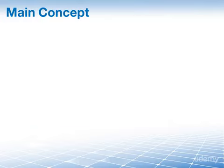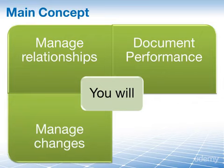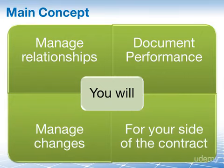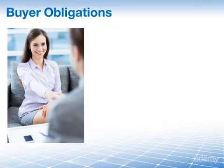The main concept you have to understand in the control procurements process is that a lot happens here in regards to procurement management — similar to project integration management for the overall project. In this process, you will manage relationships, document performance, and manage changes for your side of the procurement contract. The idea is that both the seller and the buyer perform according to the agreed contract, meaning both parties are running their own processes of control procurements from their respective points of view.